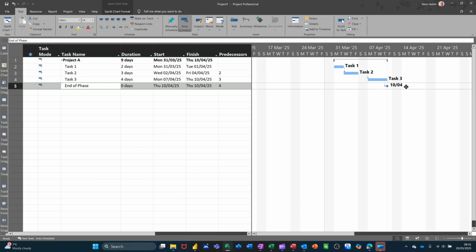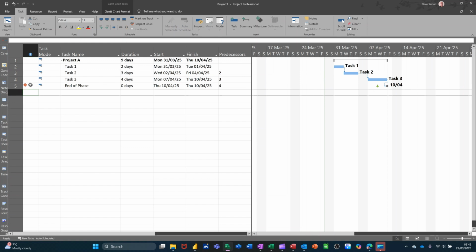You get a little green arrow coming up there. Now, you can actually move this with your mouse. If I bring it back as if you've gone past this, what you'll get in the information column is this little diamond indicator telling you you've gone past that deadline marker. So you don't get the planning wizard coming up, but you do get that.